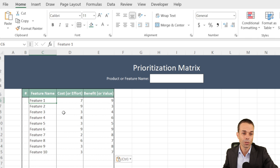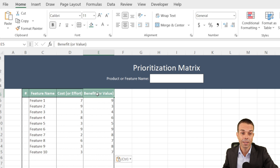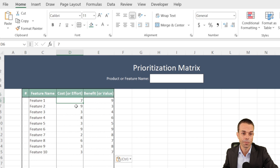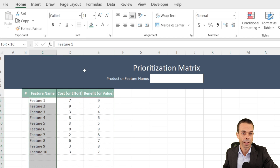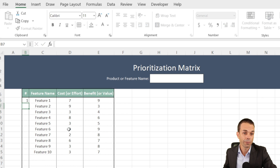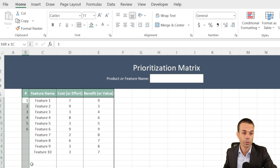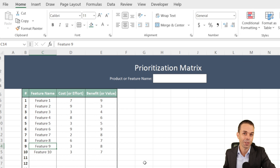Once you've put your features or deliverables here and prioritized them, a high cost will be closer to 10 on a scale of 1 to 10, and a high benefit will also be close to 10. Let's center everything in the middle, give each feature a unique number from 1 upward, and now we can start creating our prioritization chart.